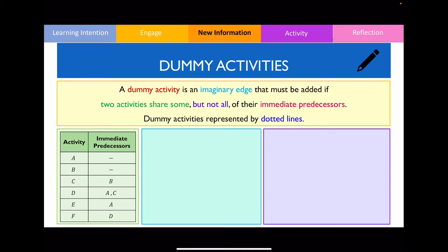We define a dummy activity as an imaginary edge or an imaginary activity that we must include in the network diagram when two activities share some but not all of their immediate predecessors. Because it's an imaginary edge, we need to represent this with dotted lines.